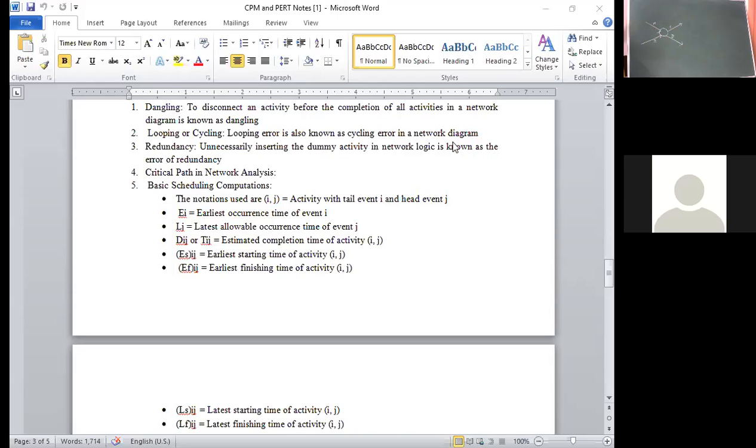Ashish, don't tell, ask other people. Saurabh, tell me this answer. What does it mean? What did you understand? A and B are the predecessor activities, and C and D are the corresponding successor activities, concurrent activities. Correct? Here, one more sentence you could add: A and B must be finished before the activities C and D start. Very good, sir. Next one.